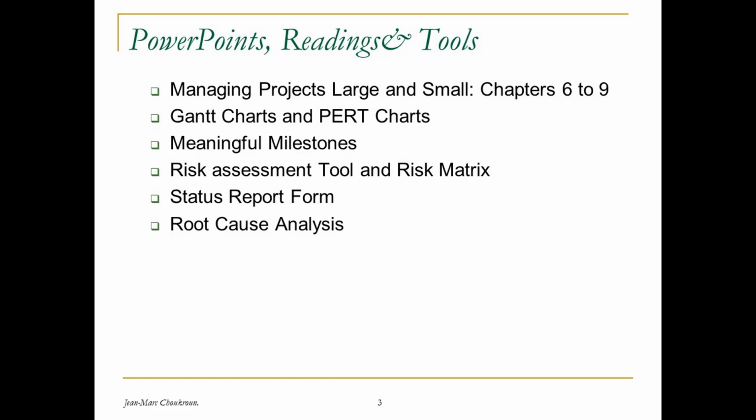in a definition of a milestone. Then I have a risk assessment tool, which is a form that helps you specifically identify certain risks and give some more definition as to what that is. And then a risk matrix, which is a much simpler, more summarizing your risks. Essentially gives you a matrix on which you can plot the various risks, and it tells you which ones should receive most of your attention and ones, even though they may exist, are not worth a great deal of time.